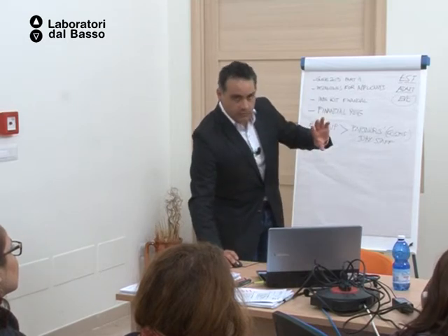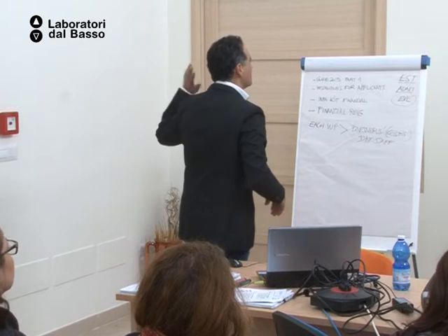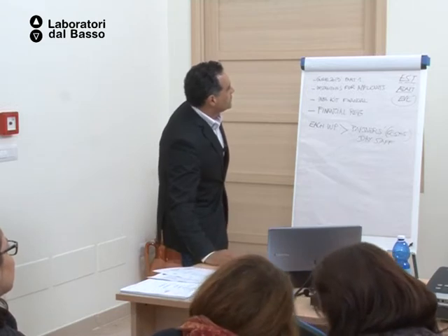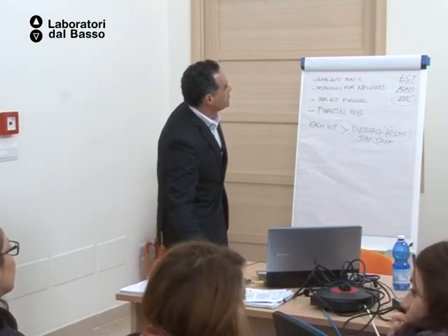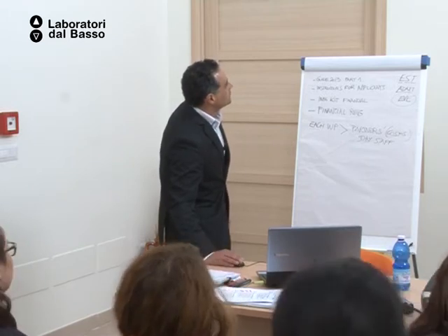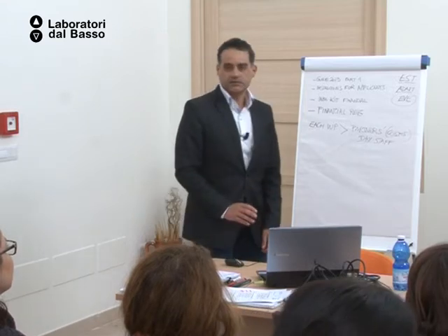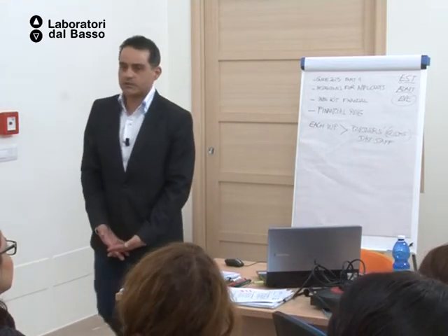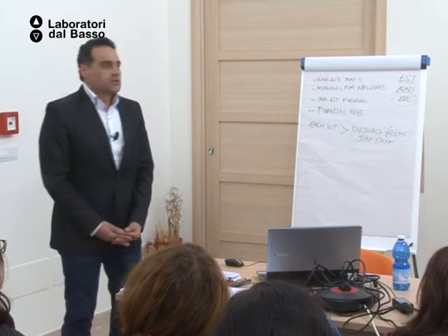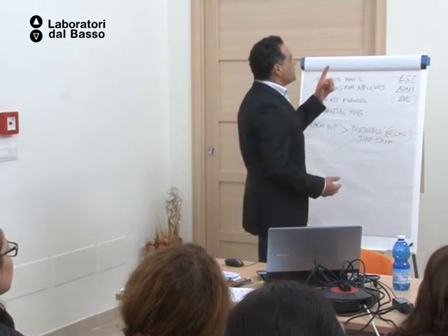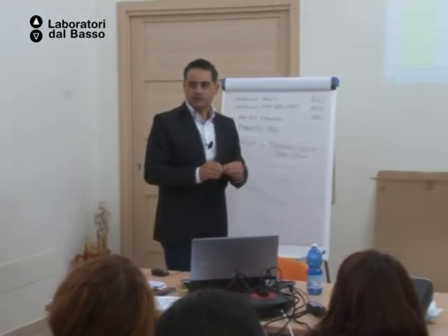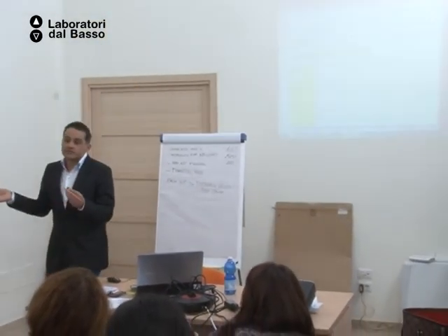So when you look at the tab, the first one on the left, you have the work packages. And you see that you can have at least 22 work packages. So here, in the second column, you will select the type of work package you're starting to fill. This means that management is management, quality plan is quality plan, dissemination is dissemination. So in implementation, you have all the rest.